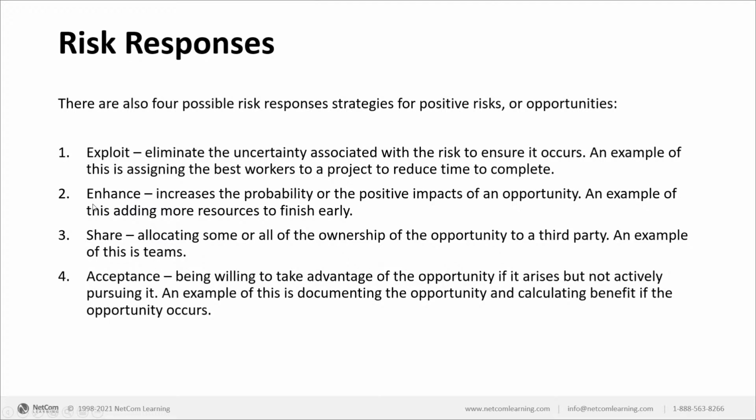Share, again, you don't have much of an idea how to go ahead and manage the risk. You go ahead and assign it to someone who has better information, a better idea than you. So you realize that there are certain areas within the project that you are not very well versed with, or that are not one of the primary capabilities of your organization. You go ahead and hire resources or teams who have expertise who can manage those risks for you.